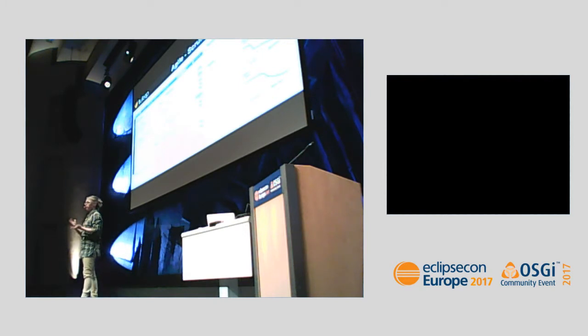For instance, by default, Tuleap provides a default Scrum workspace where you have release and sprint for the time slots, and you have epics, user stories and tasks to keep your backlog organized. But if you want to make it simpler, you can. So once again, Tuleap provides you one sort of methodology, but make it yours, the agile way you want.